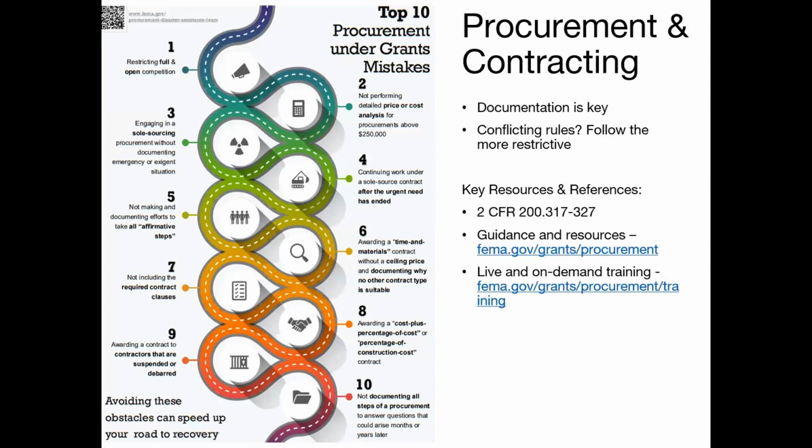State government applicants must follow the same policies and procedures that they would use for procurements with non-federal funds. Comply with 2 CFR 200.322, procurement of recovered materials, and ensure that every purchase order or other contract includes any clause required by 2 CFR 200.326, contract provisions.